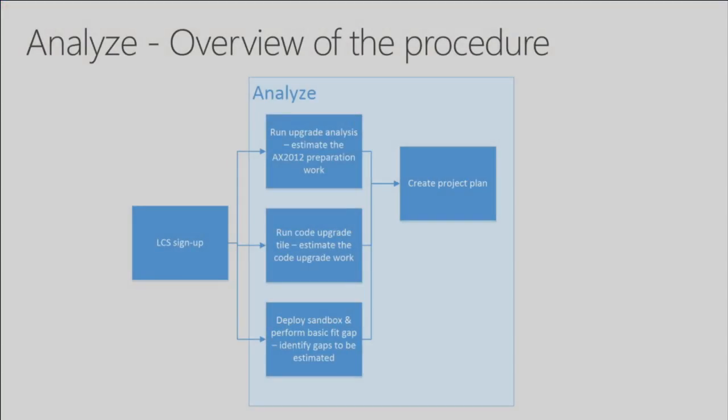So analyze. What do you do in the analyze phase? Once you sign up, this is basically a repetition of what I said. You're estimating how much it's going to take you to prepare your AX 2012 database. You're estimating your code upgrade effort, and you are deploying a sandbox environment of AX7 for a fit gap analysis. At the end, you create a project plan.